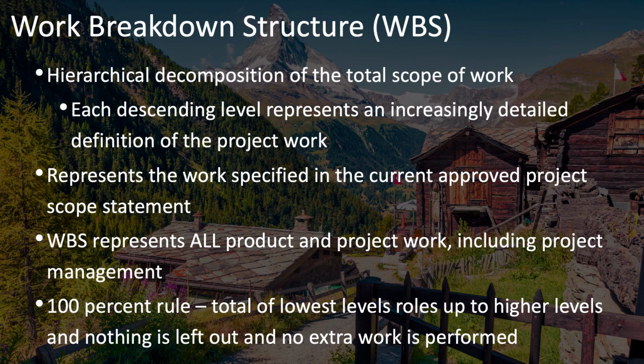And your work breakdown structure should follow the 100% rule, which means that each level of your work breakdown structure should sum up to entirely what is represented in the level above, and no more and no less. So when you're breaking things down into lower levels, make sure that you don't forget something and end up with a lower level that doesn't entirely capture the level above.